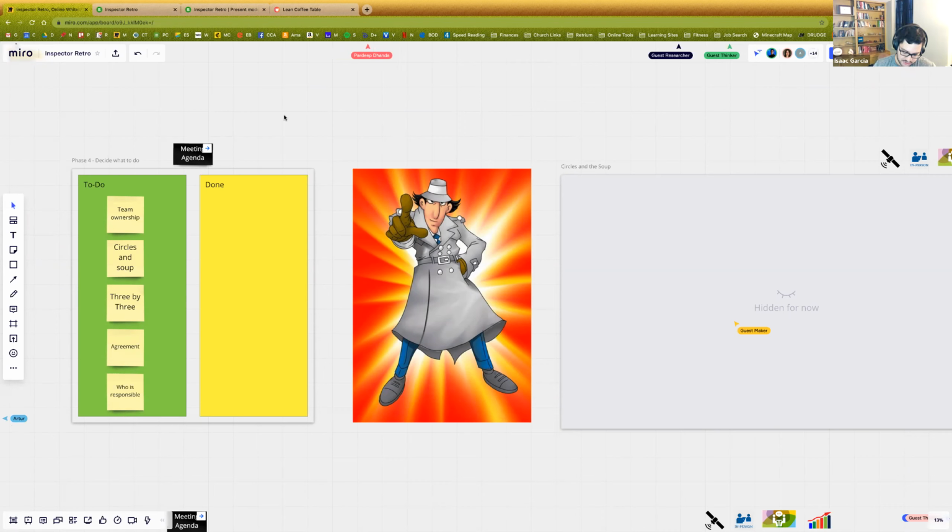Then I would go for your next one, trying to analyze. I would probably do 10 minutes trying to understand what it is you wanted to talk about, right? What do we want to talk about? Identify that. From there, I would definitely spend 15 to 20 in the next section, which is what can we do? It's really important that you clarify what are the things we can actually do, let's go deeper, let's get a deeper understanding and identify a few ways of experiments that we can run, things that we can do. I would spend 15 to 20 minutes there.